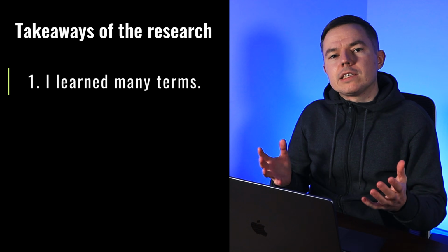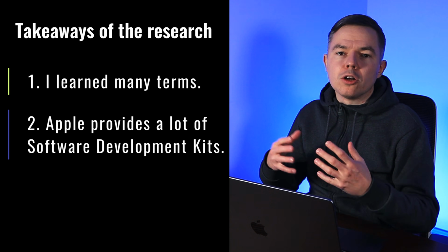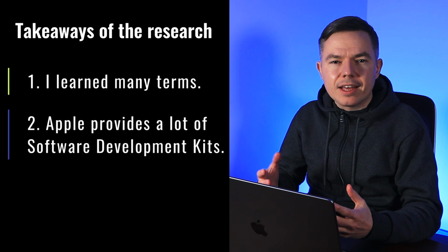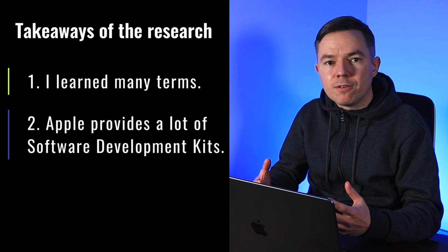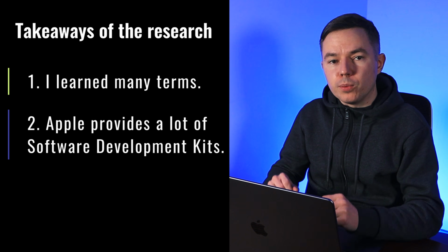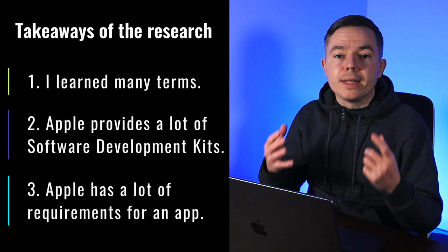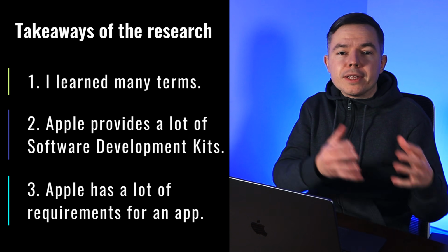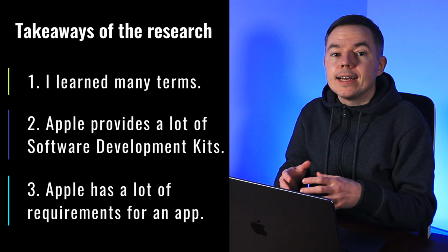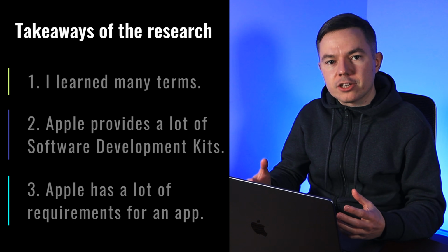So here are my takeaways at the end of this research. First of all, I learned many terms I'll need further down the road. Second, Apple provides a lot of software development kits that speed up development, therefore you don't need to use third-party libraries or reinvent the wheel. Third, Apple has a lot of requirements for an application, therefore human interface guidelines, review guidelines, and other documentation become requirements documentation for us.